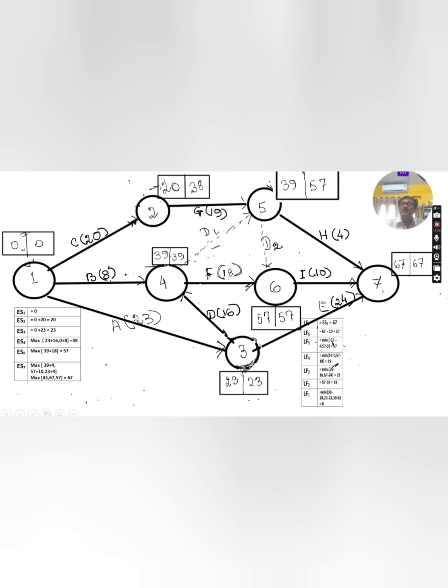Now, latest finish time. You have to start now in the reverse direction. From the last node, you have to start, and slowly move to the beginning one. So how much time will it take? This will be 7, that is the maximum time. You have already computed it. So the latest finish time for this node S7 is 67. Here I have written that the latest finish time for this is 67.